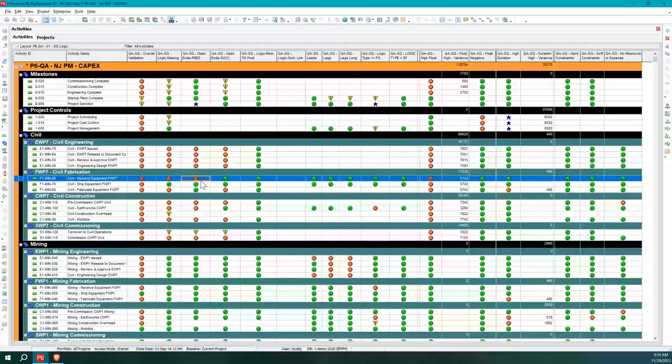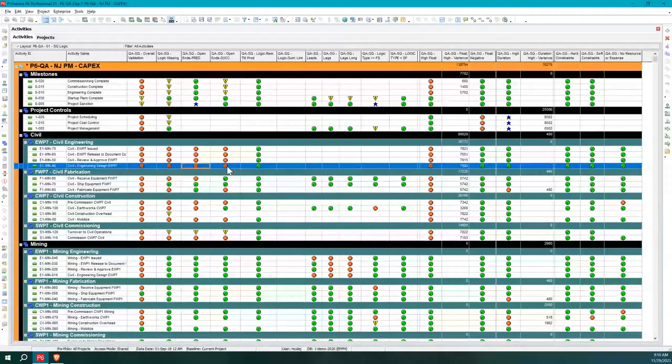So in this case, I've got a missing predecessor. I'm okay on my successor. On some of these, I'm missing both my predecessor and my successor. Okay, so that's not good, and I need to do some work on that.